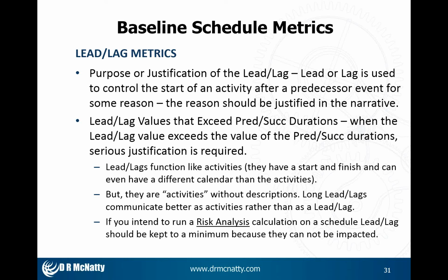Leads and lags are a common occurrence in construction schedules and precedence diagramming. It's one of the reasons why precedence diagramming took over for arrow diagramming on construction schedules, because we often have crew chases where we want to stagger the starts of activities. The problem is that leads or lags function like activities. They have a start and they have a finish. They may even have a different calendar than the predecessor and successors. But they are activities that don't have descriptions.